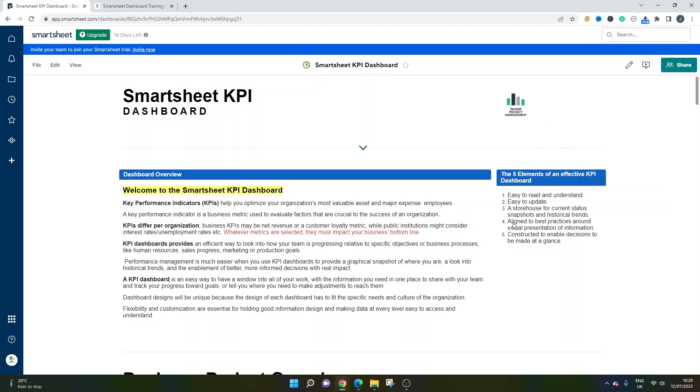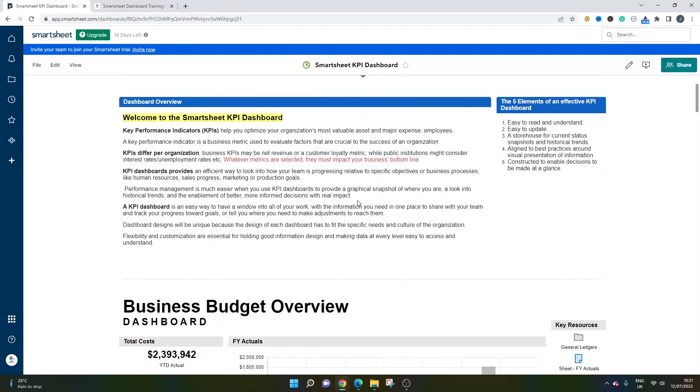The five elements of an effective dashboard are that they're easy to read and understand, easy to update, they can store current data, snapshots and historical trends that are aligned to best practices, and they are constructed to enable decisions to be made quickly and at a glance. I'm sorry if this has gone on longer than you were expecting, but I just wanted to give you that overview. Now I will be running through some of those examples. I think it's important to bear this in mind before we look at these examples.